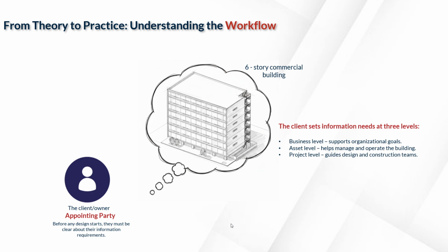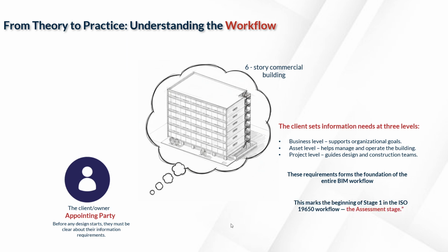The client sets out what information they need at the business level, at the asset level, and for this specific project. This requirement forms the foundation of the entire BIM workflow, and this is also where a few important documents start to take shape, which starts stage one in the ISO 19650 workflow, that is the assessment stage.